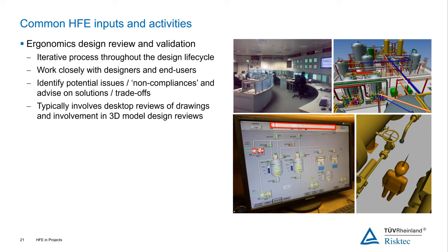And this is the key thing, really. Then what you can demonstrate is that you've had your specialist input, and where you have found an area where it's a little tricky to absolutely meet the requirement of the standards for a clearance dimension on a walkway, you're going to be able to look at that and say, well, is that going to be acceptable if we can do a few other little tweaks, or do we actually need to redesign the whole plant? So that's an iterative discussion process with the design engineers. And these typically involve desktop reviews of drawings and 3D model design reviews as well. So 30%, 60%, 90% design reviews, with an HFE person being a part of that design review team in those meetings to identify the issues.